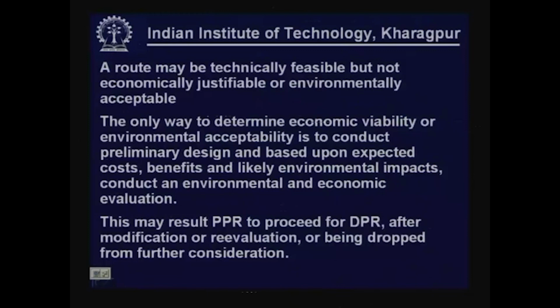Now, obviously, when we carry out all these investigations, this may result in the PPR, preliminary project report, proceeding to DPR, that means detailed project report, maybe as it is or maybe after modification, or we may drop it from further consideration. Let me clarify this point once again.